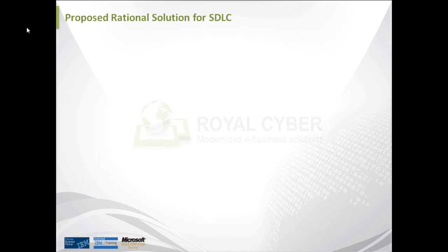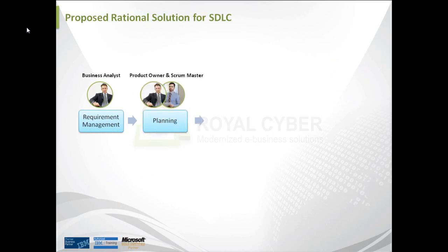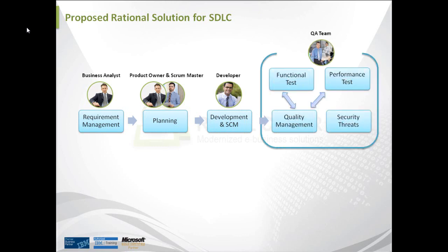According to the Scrum practice, the flow of information would be such that the business analyst would initially manage the requirements and then, as a product owner, would continue to populate the product backlog with stories against each requirement. Also during the planning phase, the Scrum Master would define the timeline, release, and required iterations, and would also define tasks for both development and testing teams.